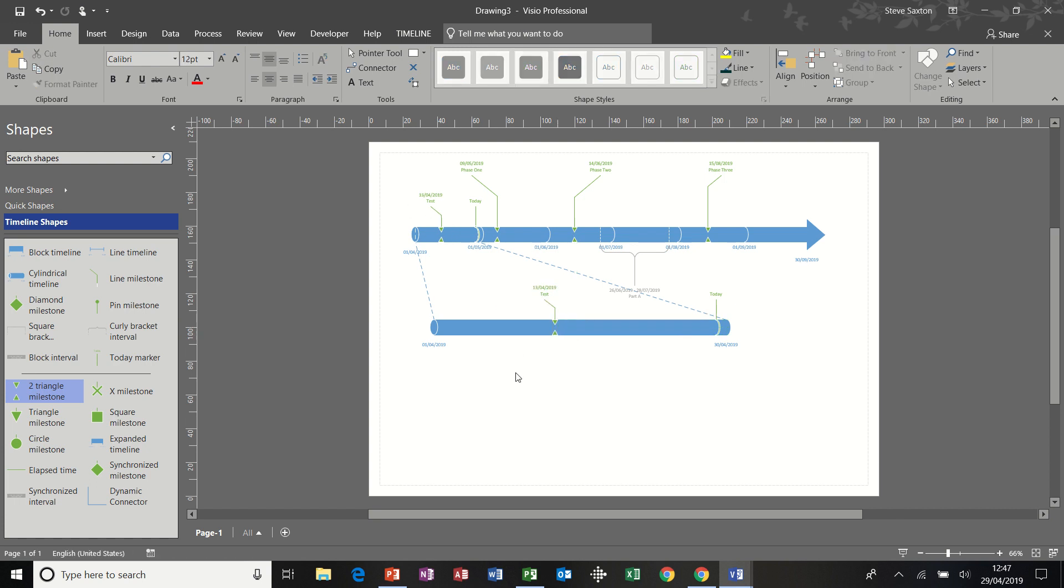So that's the basic timeline, quite a simple process. And remember, it's just an overview of a project. It shouldn't have too much information on it. Otherwise, it becomes counterproductive.